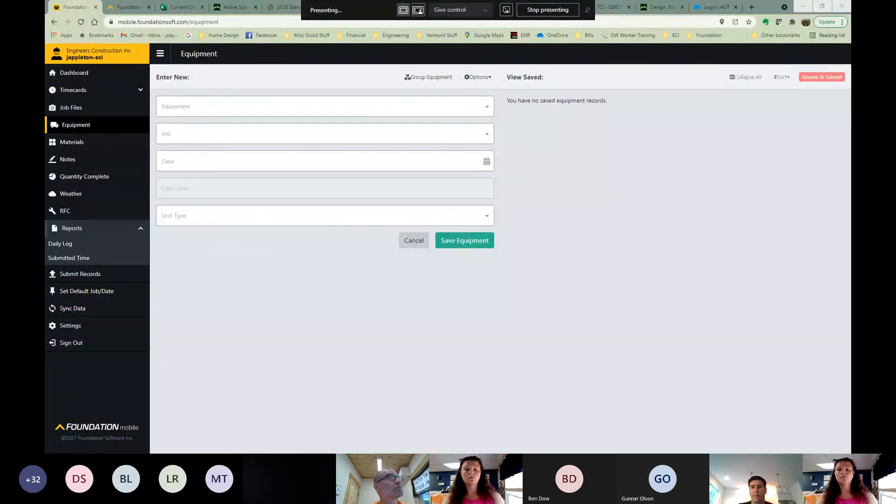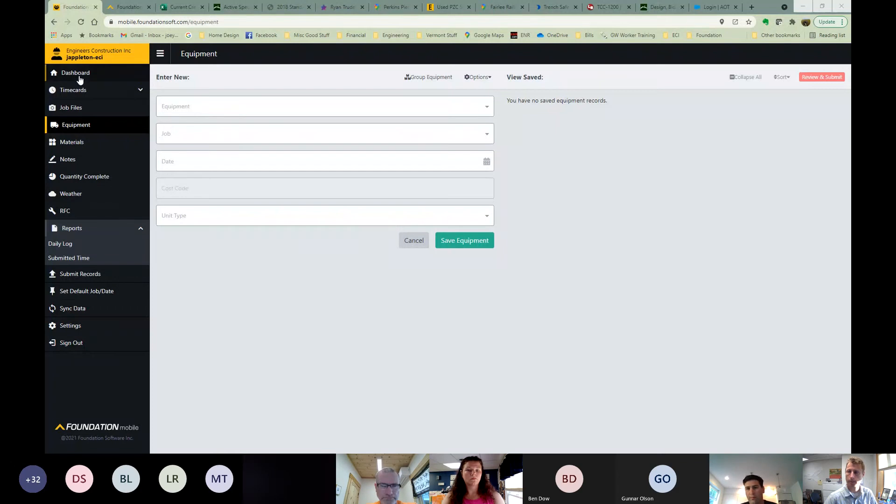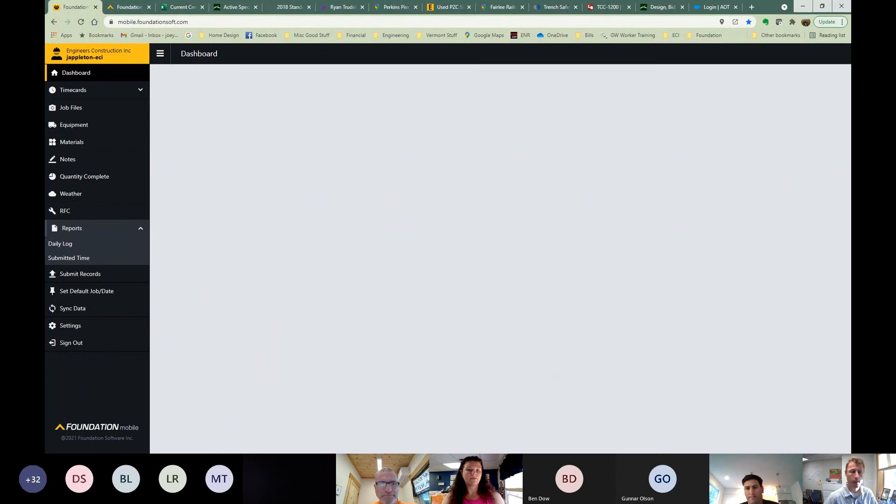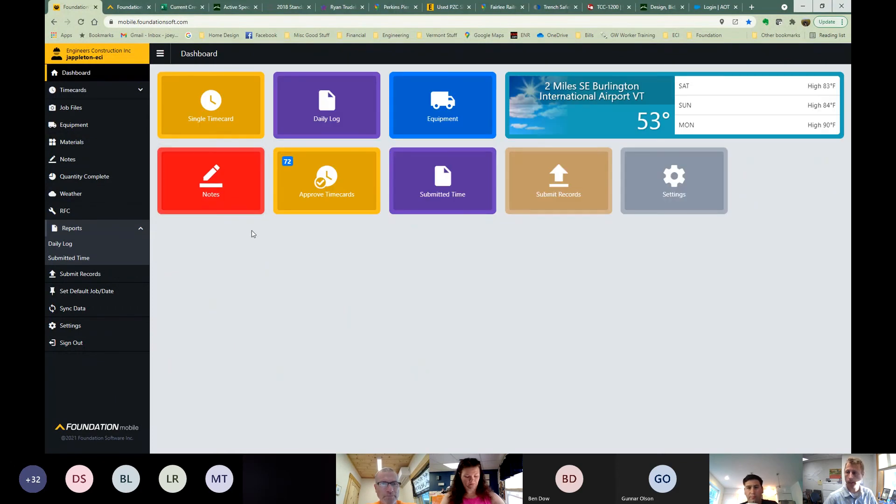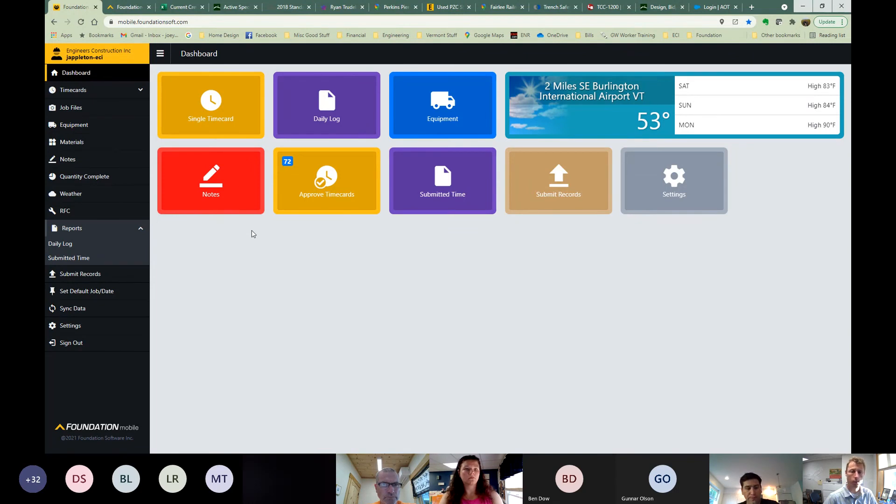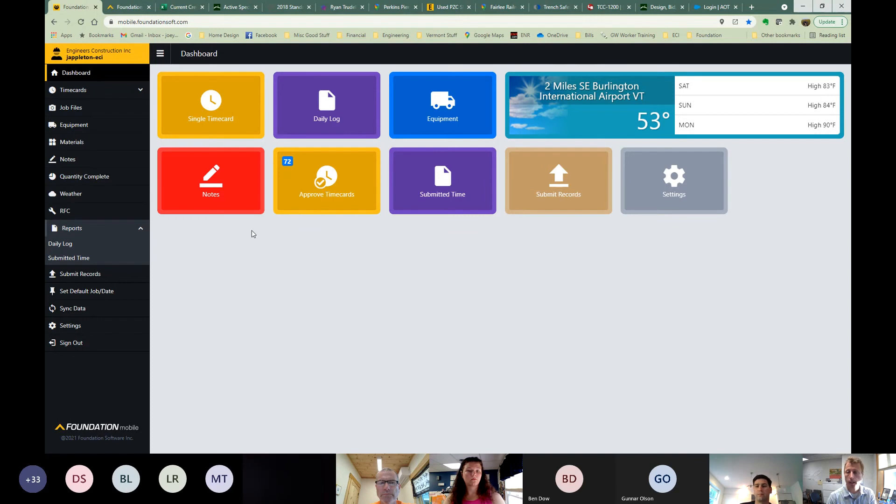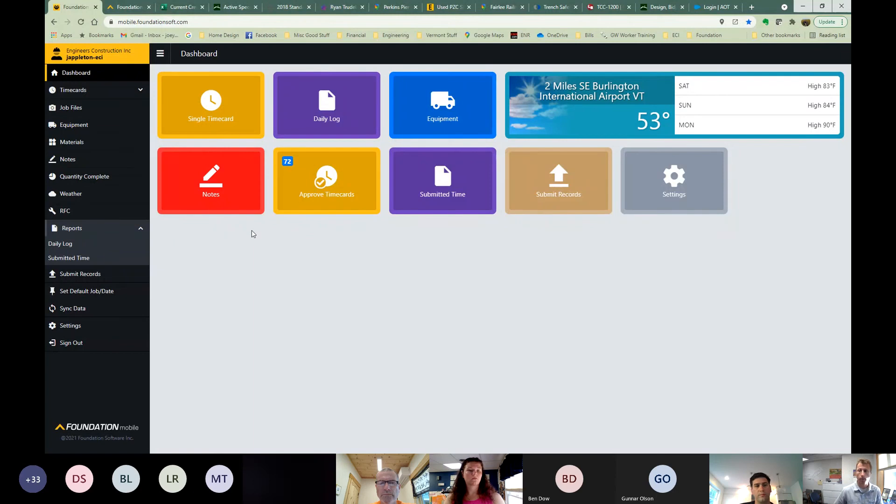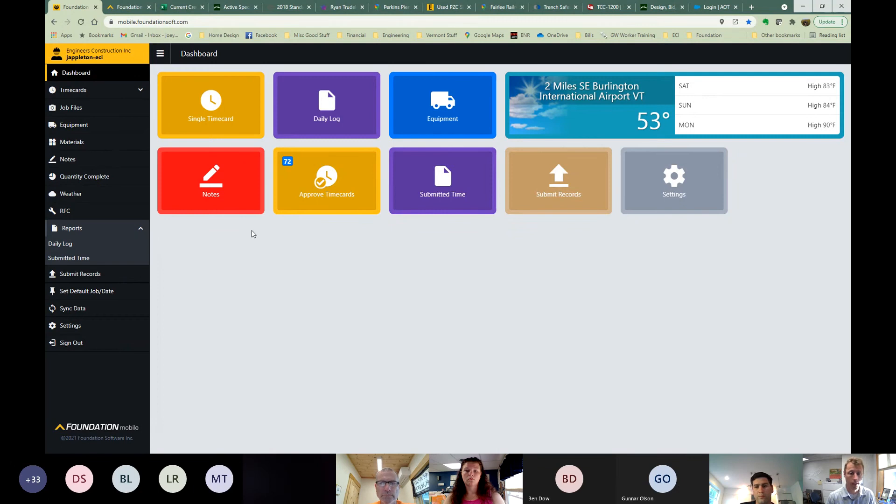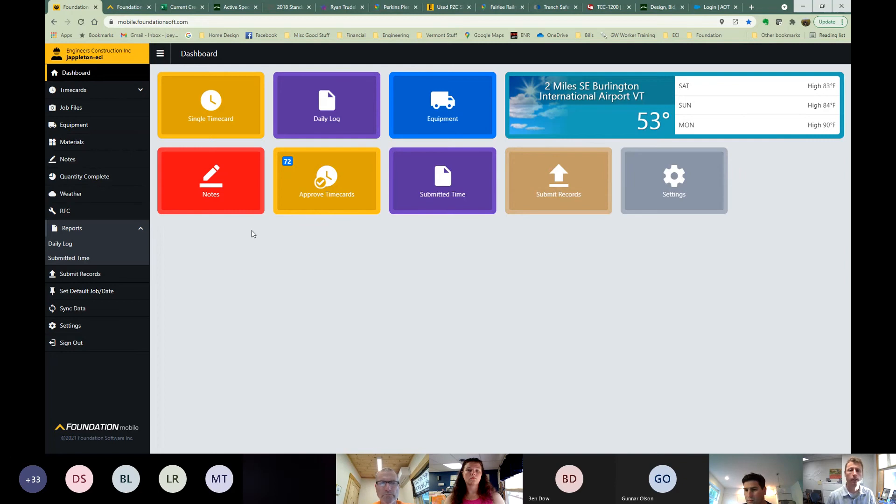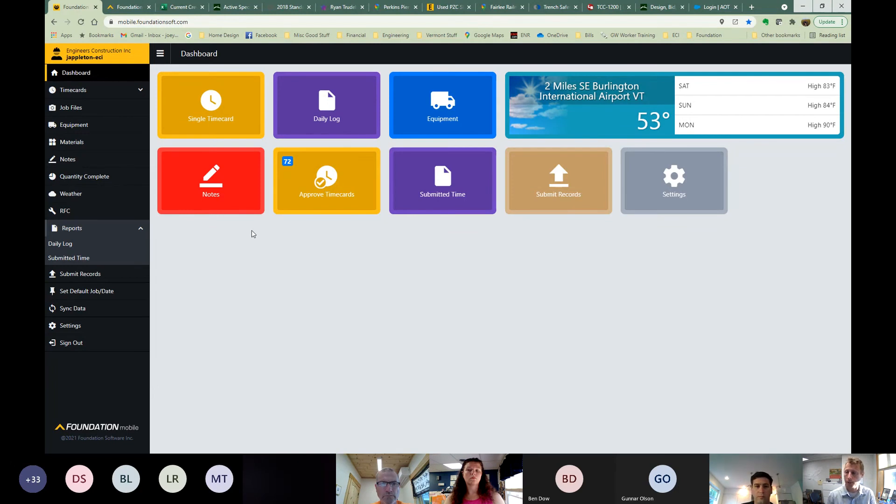We've made a little bit of an add-on into the foundation that we'd like to roll out, a process add-on regarding equipment. There's been some confusion and some questions have come in on what we do with rental equipment. When we're logging our equipment that we use each day on our job, how do we deal with rental equipment? And then on the project management side, we've been going about how do we manage the costs of fueling rental equipment because we dump fuel in them all day and that goes onto our fuel cards, but our fuel cards don't get divvied up on the project. When we have a big job that's got a lot of rental equipment, basically the job gets fuel for free. So there's a little project management component to it as well that we're trying to tighten up.